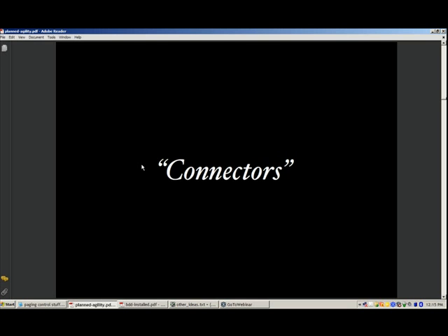And in that post, perhaps we have this notion of category or tag. Let's say category, and let's say that we've envisioned the system to have every post has a single category. Well, you can easily break off a story that's about managing categories or things like that. And in the post story, perhaps what we do is we just have a static list of categories. So we don't have to deal with that.